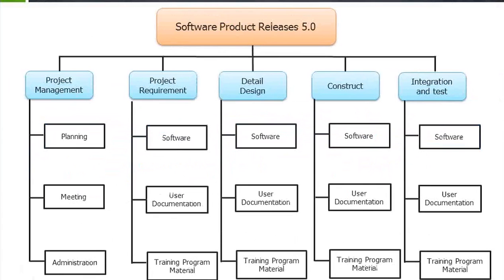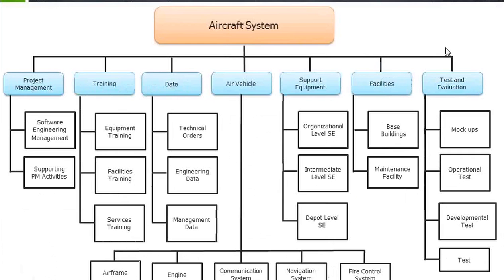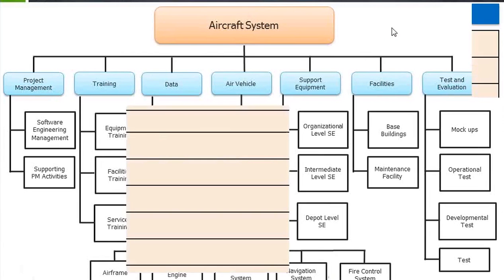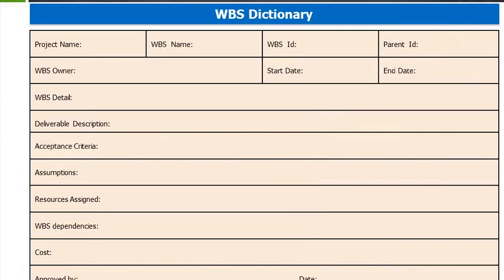Another approach is decomposition by phase — such as project management, requirements, design, construction, integration, and test — or it can be based on major deliverables. So there are three ways of decomposing a WBS.